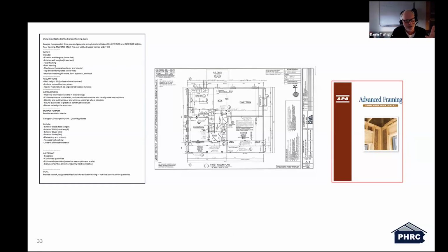My initial prompt was very small. And so I got back a materials list breakdown, but it just gave it in a Word document. And the more I learned, the more information I put in there. And actually, what I learned was I can put it into an Excel spreadsheet. So I explained to it what I wanted. I want this in an Excel spreadsheet, and I want it to be able to interpret costs, so I can put costs in on individual lines.